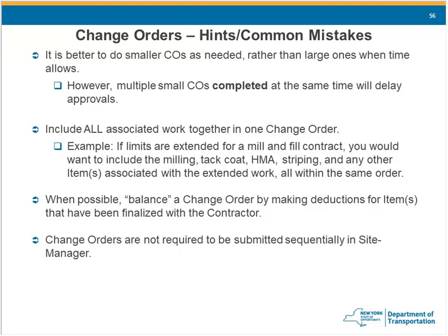But like she said, there can only be one change order in that OSC system at a time. So if you have a situation where maybe you have a time-sensitive time extension, that still requires that typical 1 week wait for OSC approval. If you got a small order in front of it, you might want to let your region know that, hey, I got this time-sensitive time extension that I want to get in ahead of that smaller change order. We can communicate that with main office and typically get that done.